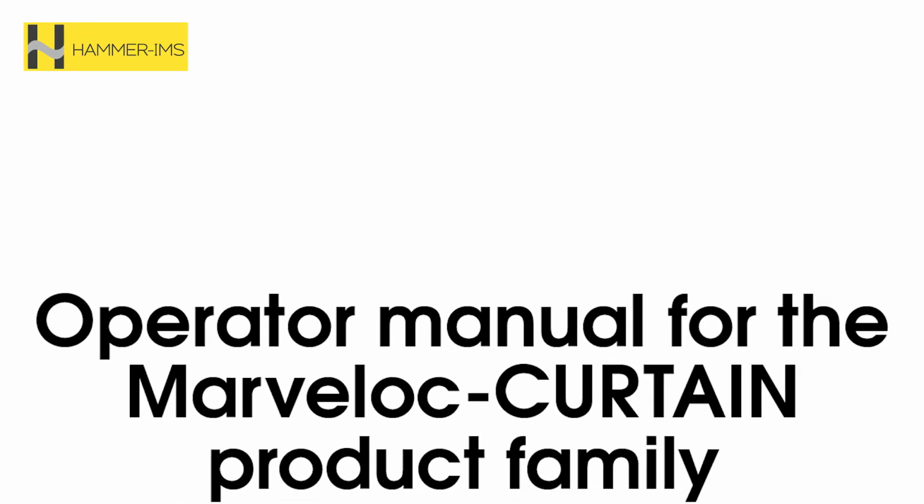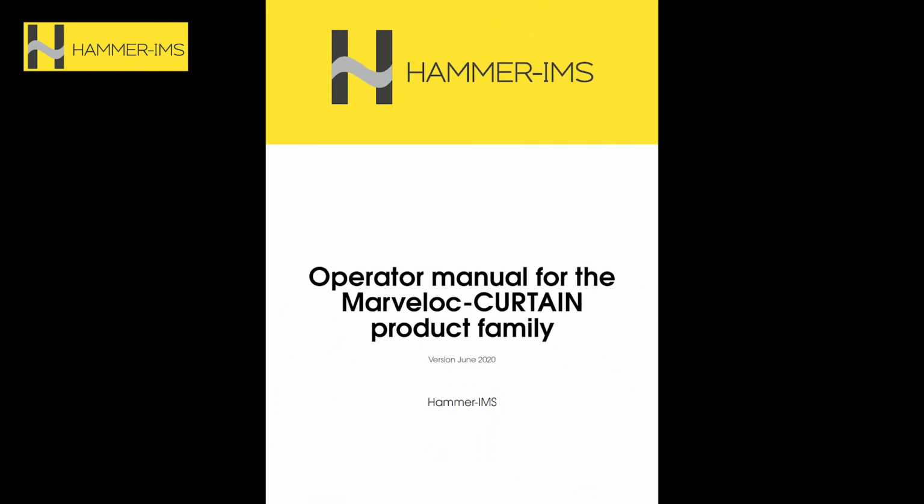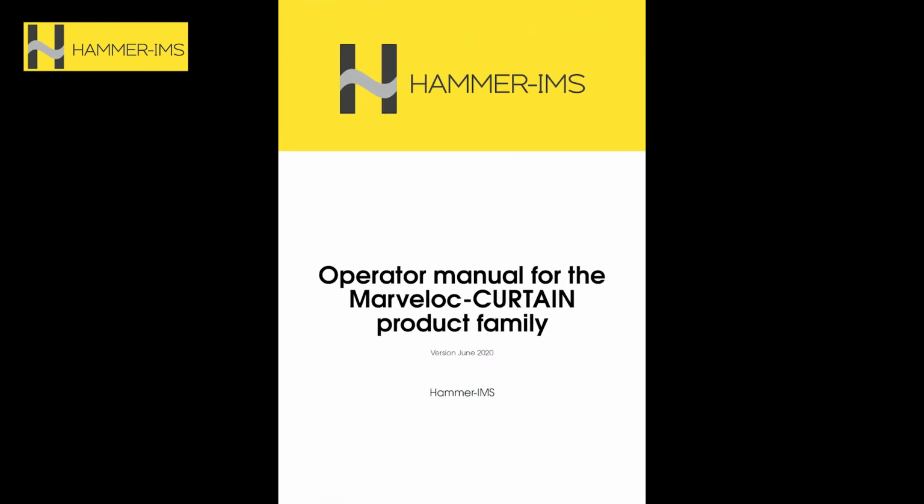The concluding step is providing on-site training and handing over both the operator manual and the technical manual. We foresee hands-on training next to the machine. After receiving concise training, the operators can use the machine and the software and conduct measurements. They will be able to interpret the measurement results in order to ensure proper quality control of the ongoing inline production. We also hand over the documentation package, including appropriate operator and technical manuals for later reference.